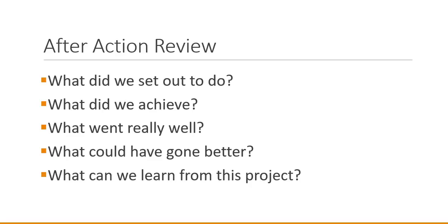First, what did we set out to do? What was our original plan? What were our original desired outcomes? 2, what did we achieve? What are the actual outcomes of the project? 3, what went really well? What happened in the project that was exactly as planned or maybe even exceeded expectations?